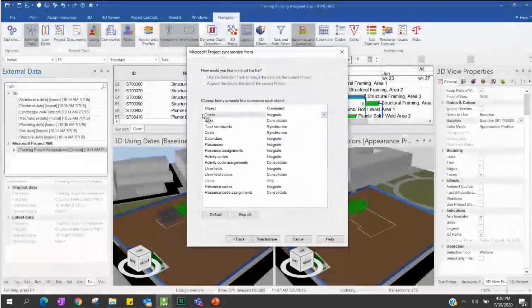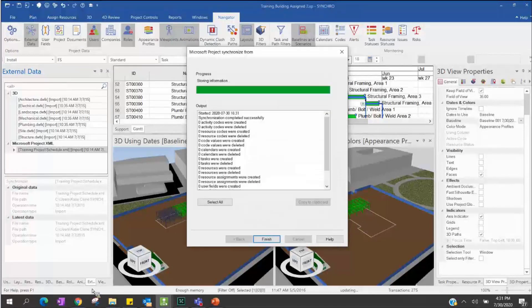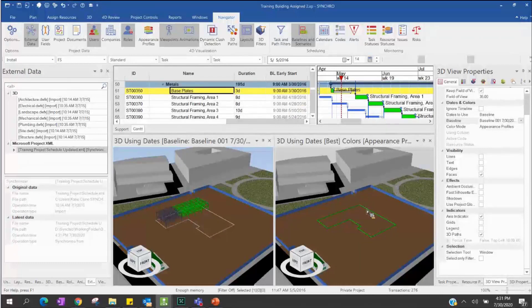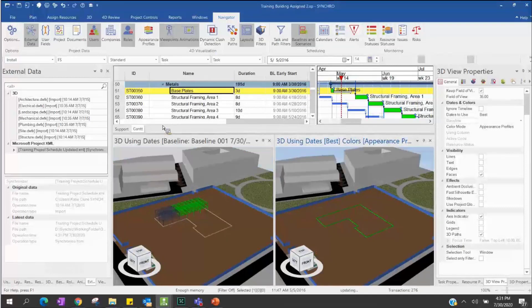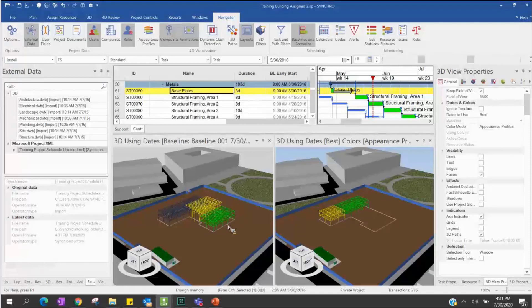Let's go back to our Synchro. This time I will use Integrated — the standard one. After synchronizing, we can see the new data is completely moved with the baseline. We can do the simulation again and see how it looks. The new schedule is slower — the baseline is already finished up to this frame, but the current schedule hasn't started certain elements yet.